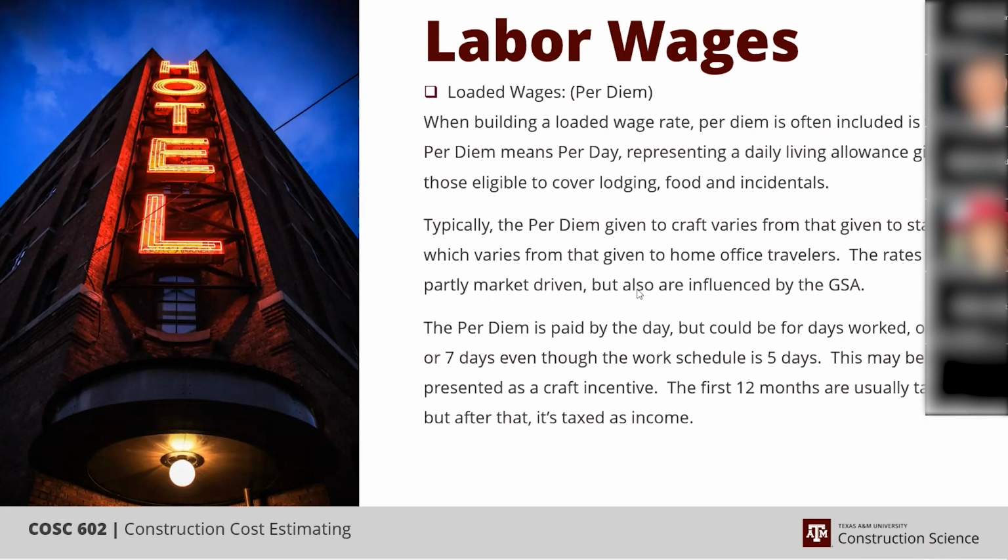And what's even better is that the first year is tax free. It's tax exempt because it's considered compensation of expenses. Just like when we travel and we turn in expenses, we're not taxed on that because it's reimbursing us for costs that we've incurred. Per diem is the same for them. Once they get past 12 months, then they get taxed on it because the government says, well, if you've been there at least a year, you live there now. So you ought to be paying income tax on that.